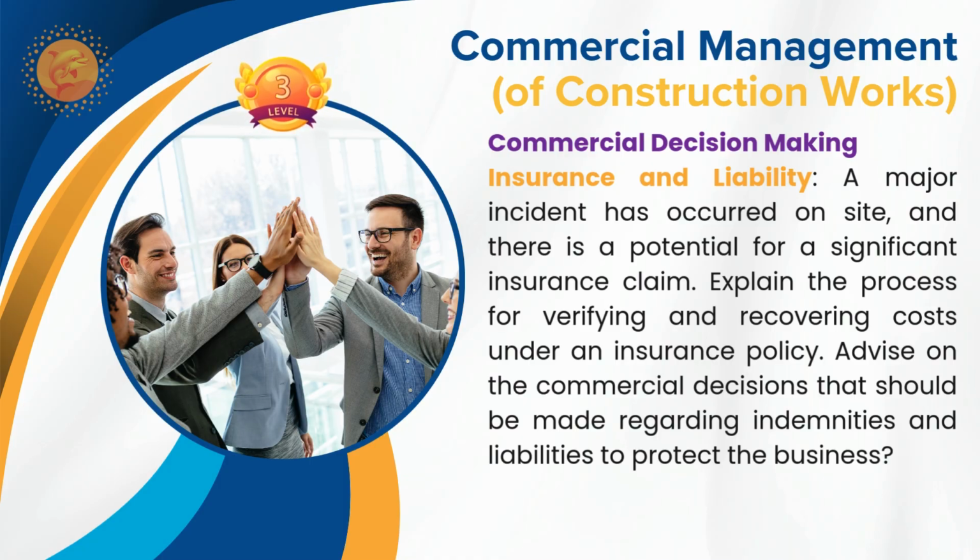After the flood, a lot of permanent work was damaged in my project. So I immediately informed the insurer regarding the damage. I took photographs and video clips of the damages, and prepared the list of damaged permanent works, material losses, or any other third party losses along the project. I informed the insurer, and the insurer visited our site and confirmed that the losses are there.